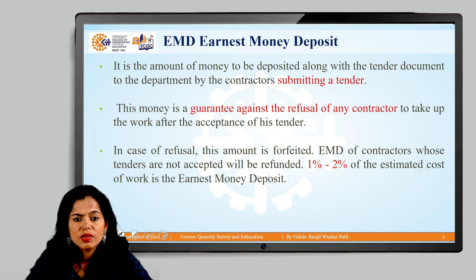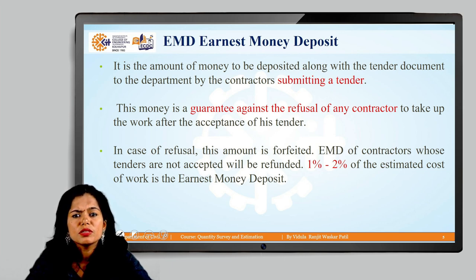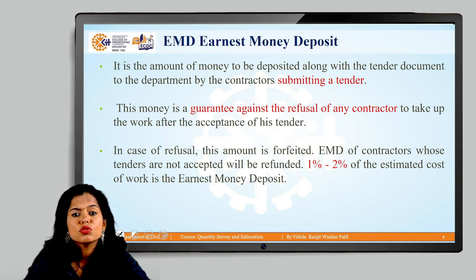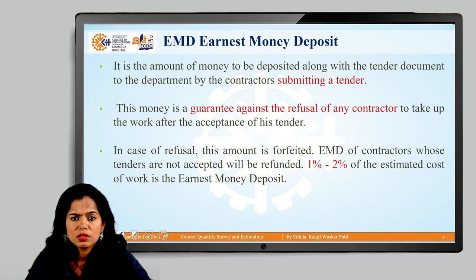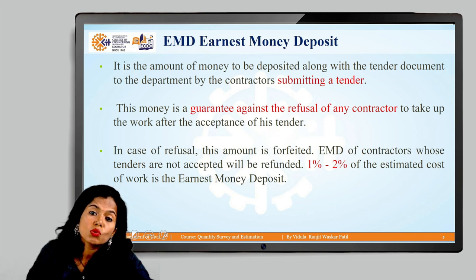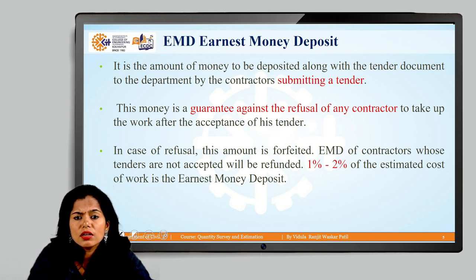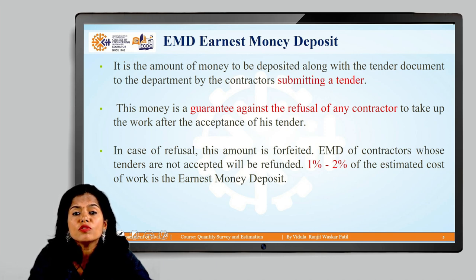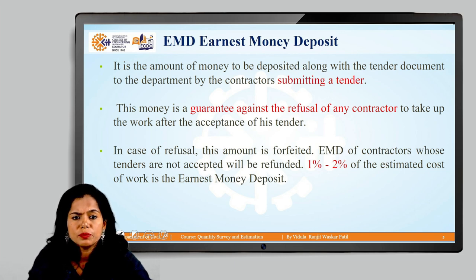A common terminology in the tendering process is EMD — Earnest Money Deposit. This is an amount deposited along with the tender document by the contractor submitting the tender. It guarantees against refusal by the contractor to take up the work after acceptance of their tender, preventing non-genuine bidders from participating and delaying the process.